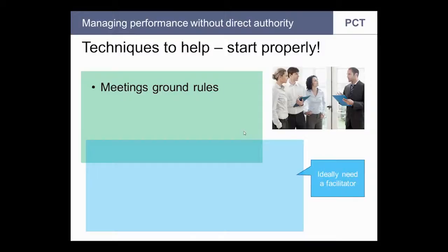One of the most damaging problems, if it's not addressed, is where the team members are not clear of their roles and the roles of others. This can be addressed using the responsibility accountability matrix, sometimes called RACI. Another thing that can affect performance is unspoken disagreement about the best frequency of meetings or expectations for email and telephone conversations around certain aspects of work. Agreements about these are helpfully recorded in what's called a communication plan.